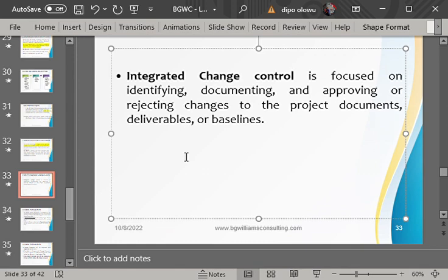Now you check the impact this additional feature will have on cost. Will it make my cost change? You check. Will it increase my schedule for delivering the project? You check. Will it affect the entire quality of the project? You check. Will it increase the resources that I have on this project? You check. By the time you discover that it does not have impact on